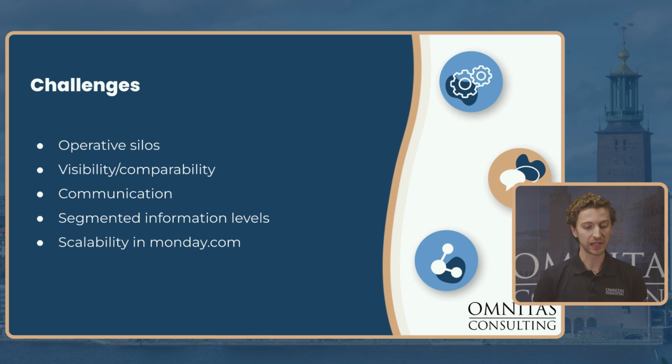And then lastly, we have another piece of this pertaining specifically to Monday.com, and that is Monday.com is an excellent tool in most ways, but there are, of course, some limitations, and usually those limitations will be volume. So, for example, the amount of total tasks you can have in a single space, what's called a board in Monday.com. So getting around that and actually creating a very scalable solution for middle to large size companies, or even just companies who have a lot of projects with a lot of tasks, can be a bit of a challenge initially.